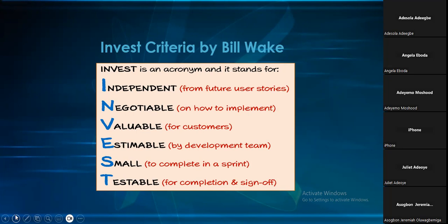Let me give you a very, very common roadblock. For example, budget constraints. There was budget for the thing before, then suddenly the organization thinks, you know what, let's put this project aside, or this particular thing on that project, let's put this aside, let's work on this aspect of the project. So because of budget constraints, and you started that story already, and this thing happened during the course of it, you can always put that story aside. And instead of it rolling over, you just put it in the backlog when you end the sprint.